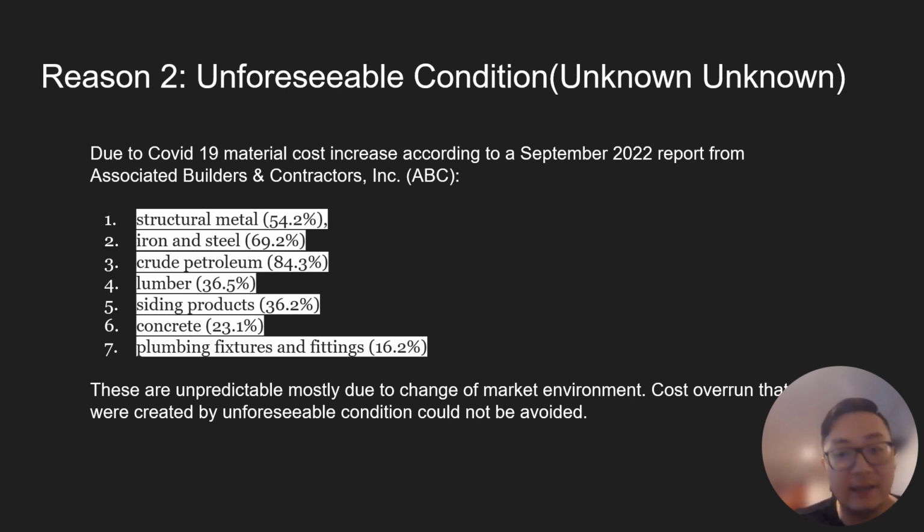And we can't predict that unless any of us here are prophets and have magical powers to know what's going on in the future. There's no way any project team will be able to predict that the cost is going to go up. That's why we have to pump up the cost before we start a project. It's just unknown. It's something that we can't deal with, and that is one of the characteristics of a construction project, since construction projects usually take a long time, and there's no really meaningful way to predict what's going to happen to the material market, labor market, real estate market.